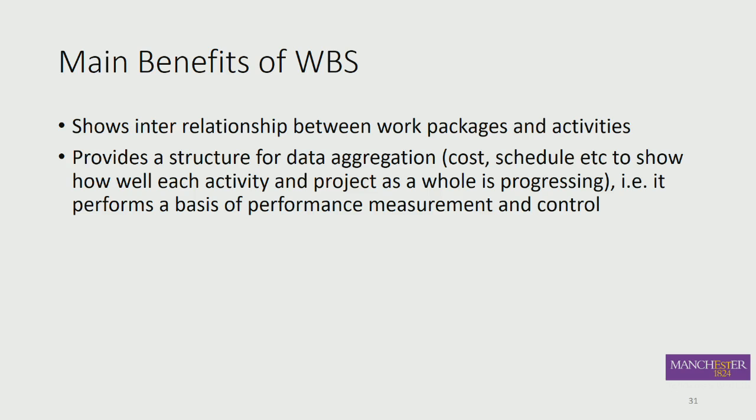So basically, our breakdown structures provide the vehicle, the platform for our plan going forward. So, remember, you've got some insight into the complexity of the decision, how subjective it is from an engineering perspective, and how you need as many perspectives as possible to get the optimal plan. But it starts to form the basis of what we call the performance measurement baseline, PMB, and that's the platform from which you measure progress. So after you've detailed planned the project, you then start to execute the project and compare the progress you're making against the performance measurement baseline,